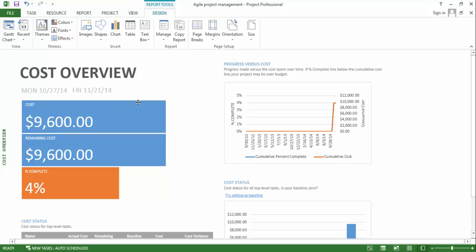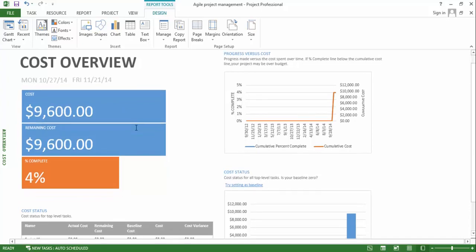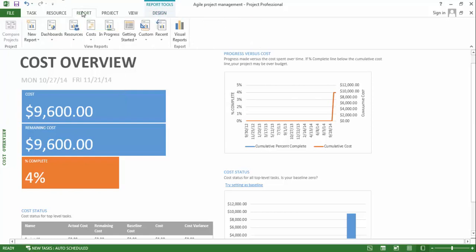Here we can see the result, and now it shows it has automatically calculated the cost of the resources by multiplying the hourly wage and the number of hours that the worker will be working on that. And there are also other reports which you can find under here.